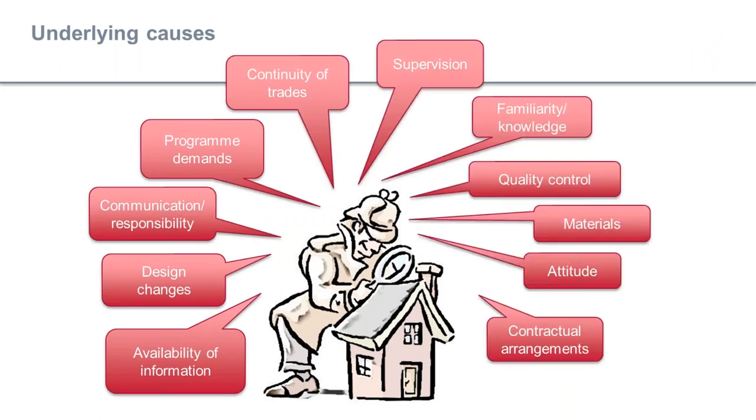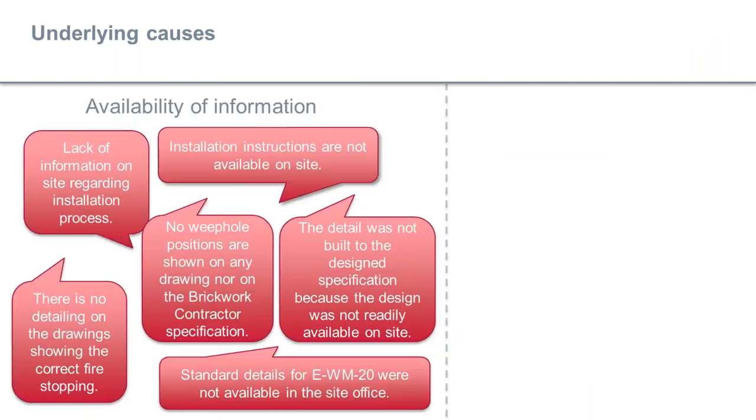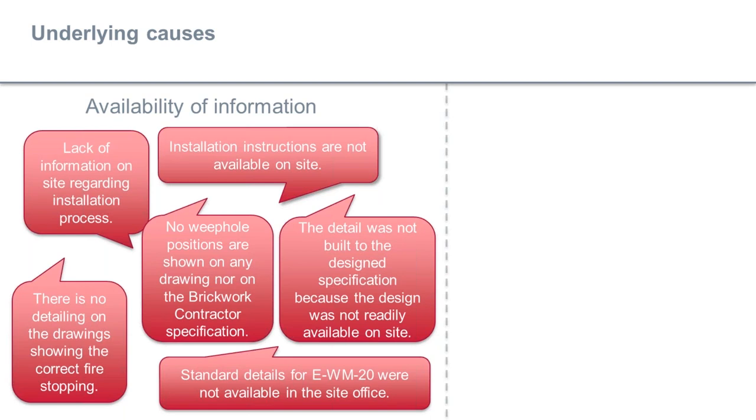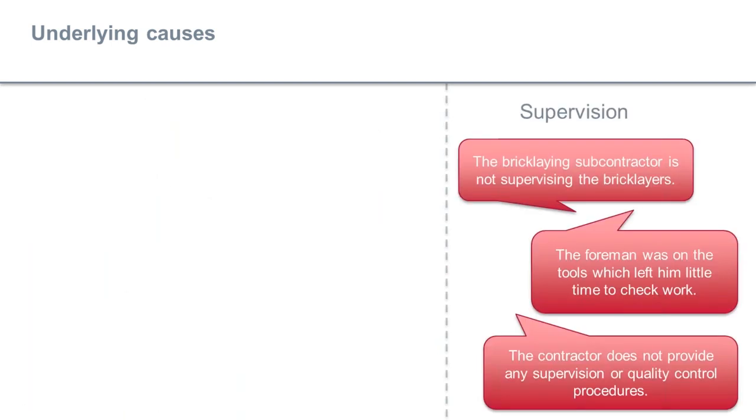We've also spoke to hundreds of site managers, trades and senior managers and identified a number of underlying causes for defects. We found that it's not always the trades fault. One of the largest underlying causes of defects is the availability of information. It's typically stuff such as lack of detail on drawings or no information being made available to those undertaking the work on site. This reminds me of when I was on site, some ground workers were putting in ventilation to a suspended ground floor because there was radon in the area. They had no details showing where to put the vents nor any positions of door openings. This led them to occasionally put vents in doorways, which meant they were broken out, filled in, so ventilation requirements weren't being met. Feedback is key.